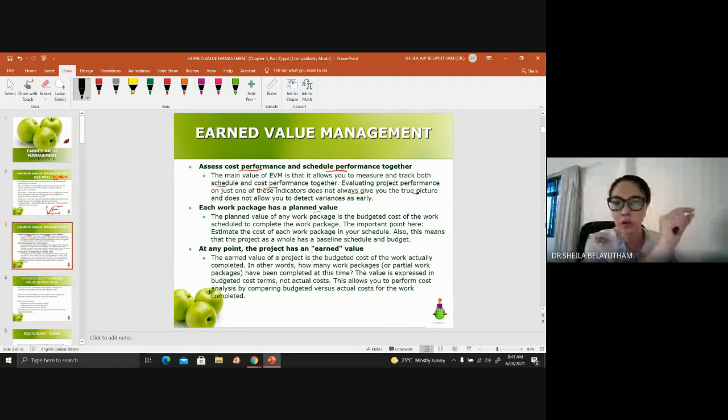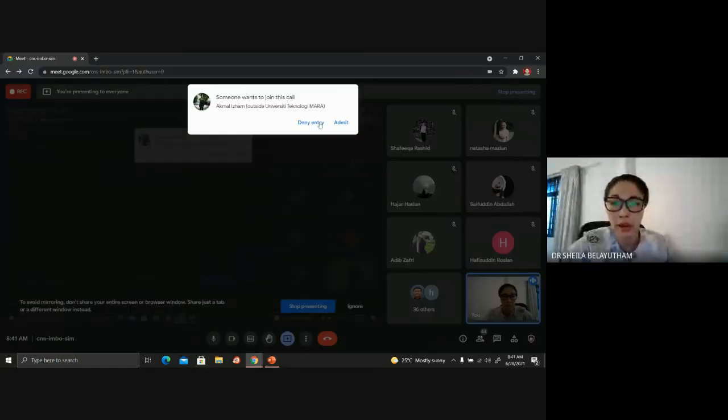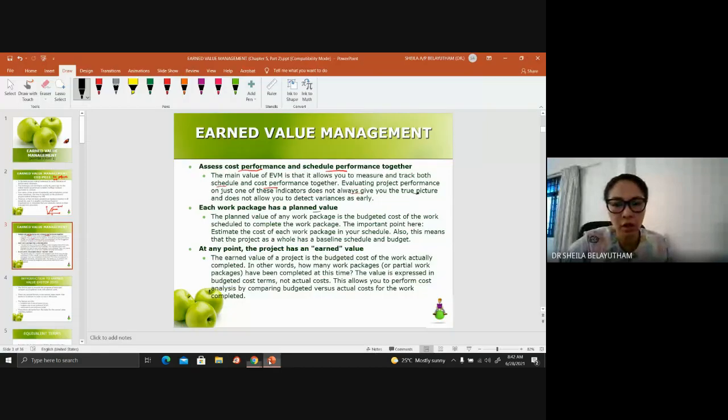Your cost factor is taken from the contract document, so you have the specification for each activity. You divide equally based on the days or the weeks, so you can see every day or every week how much sum has been allocated for all the combined activities. That is where you come up with the S-curve. Hence, it is based on a planned value.